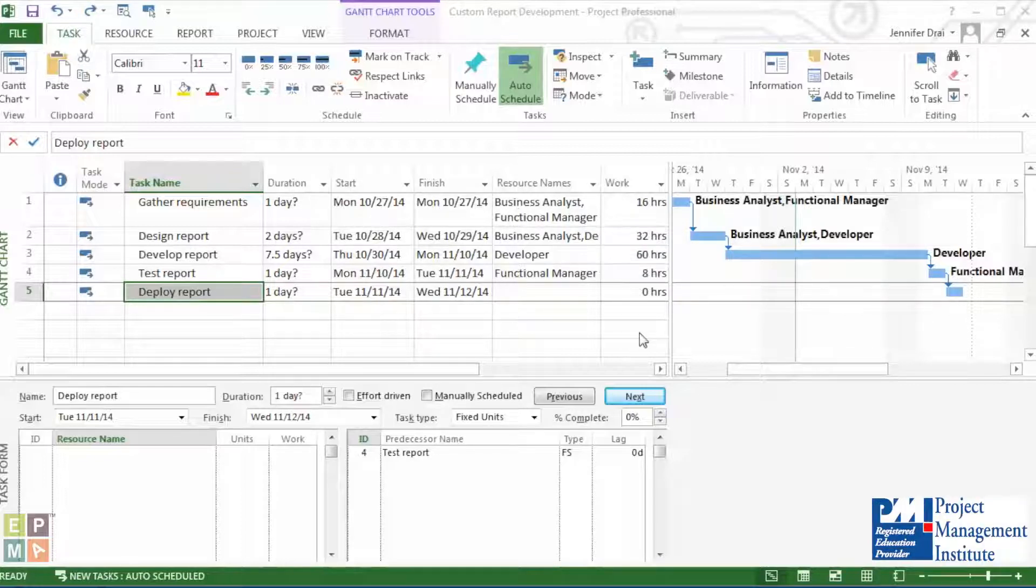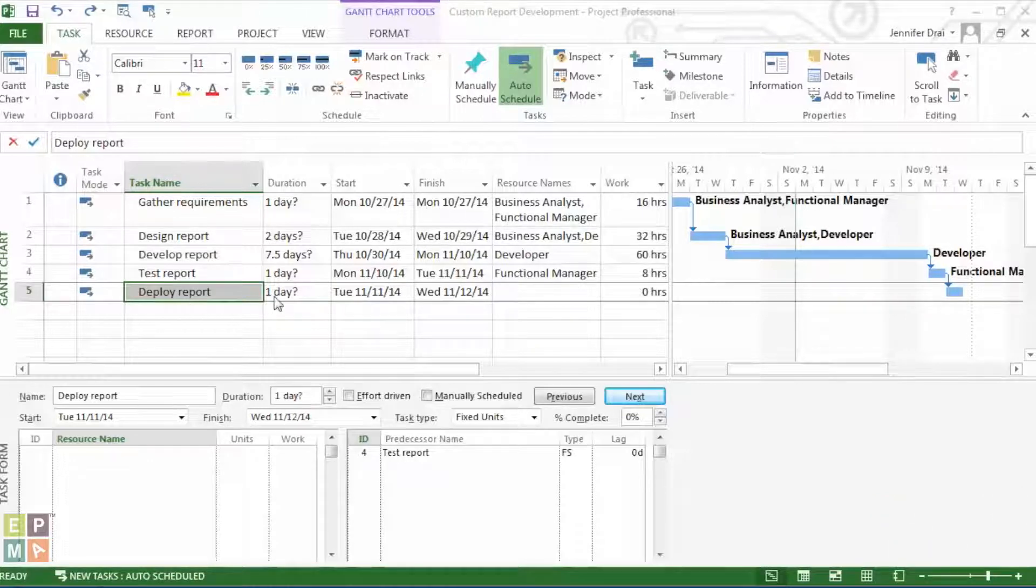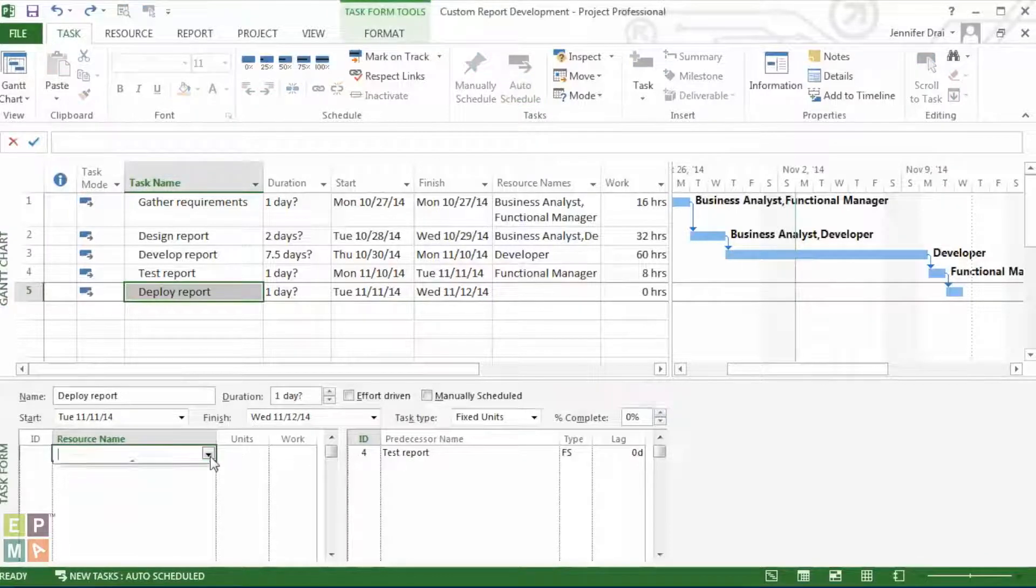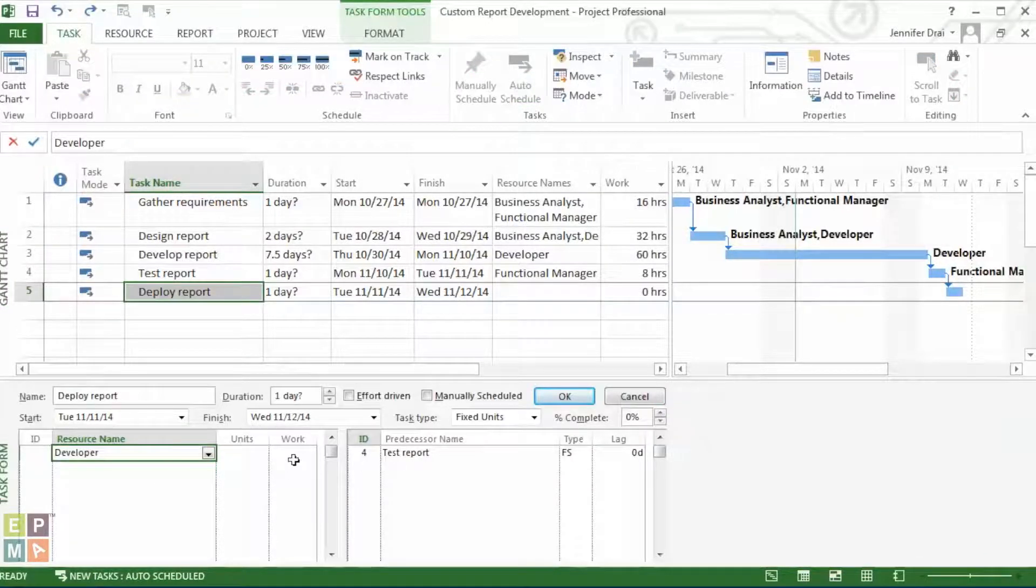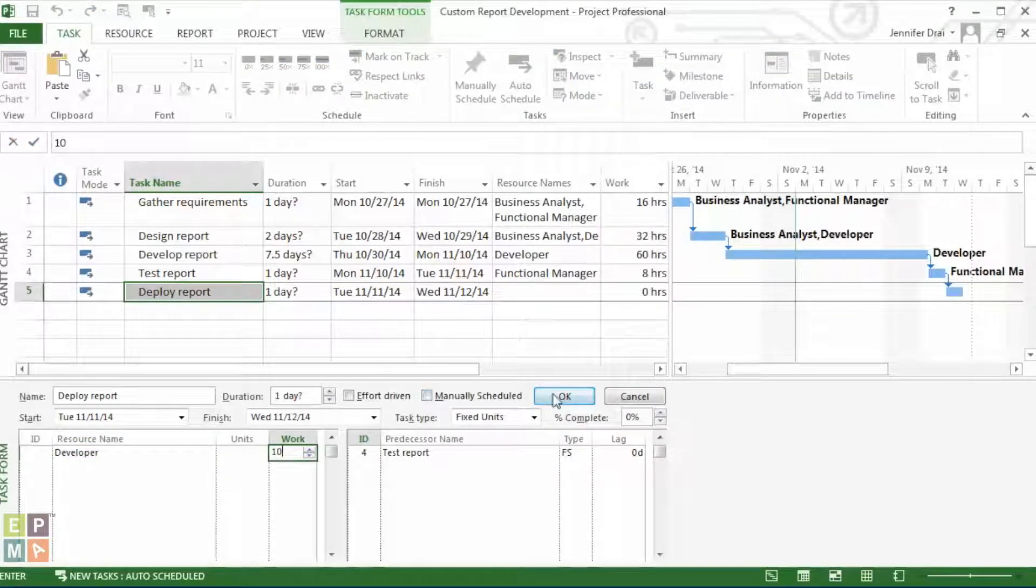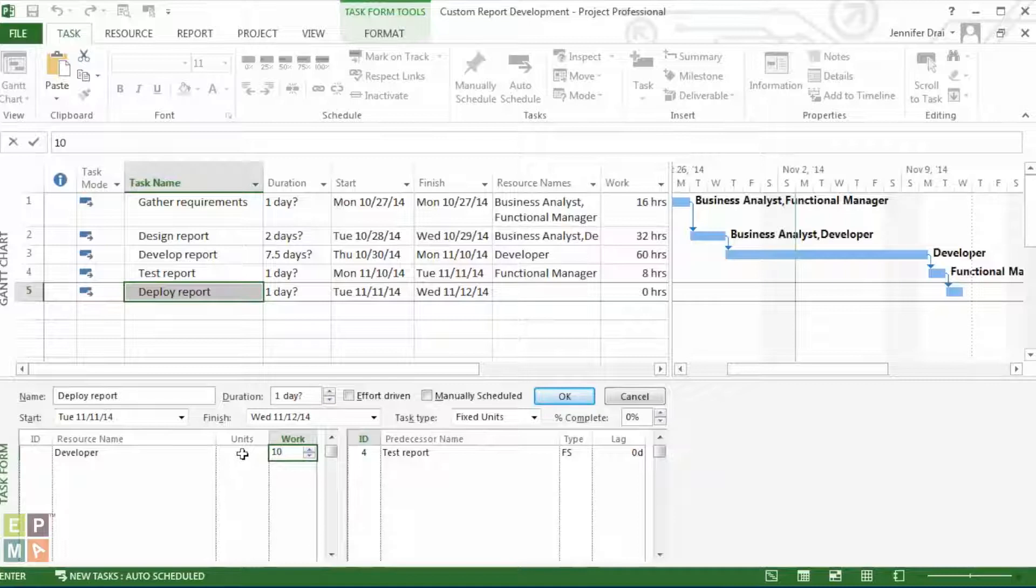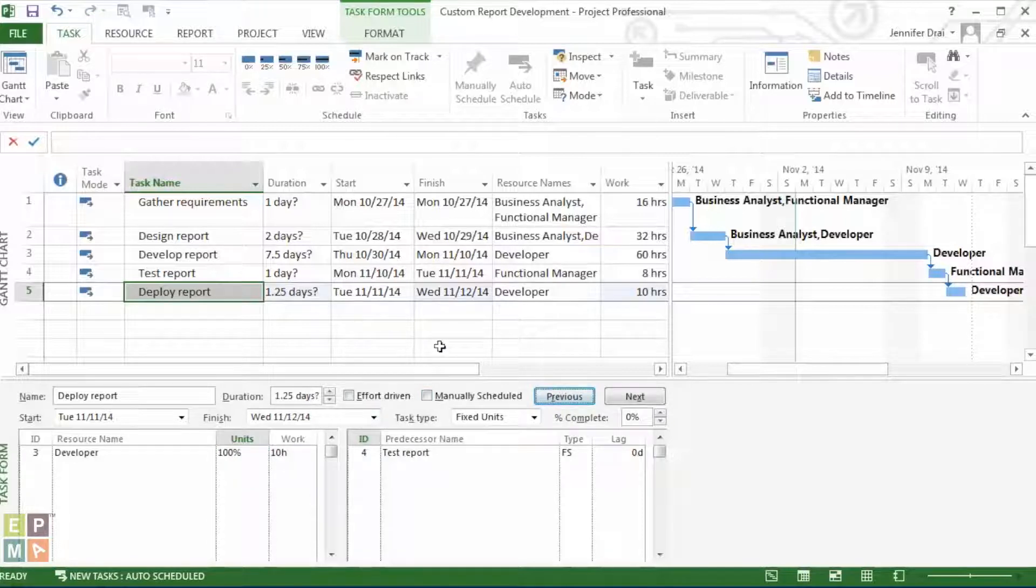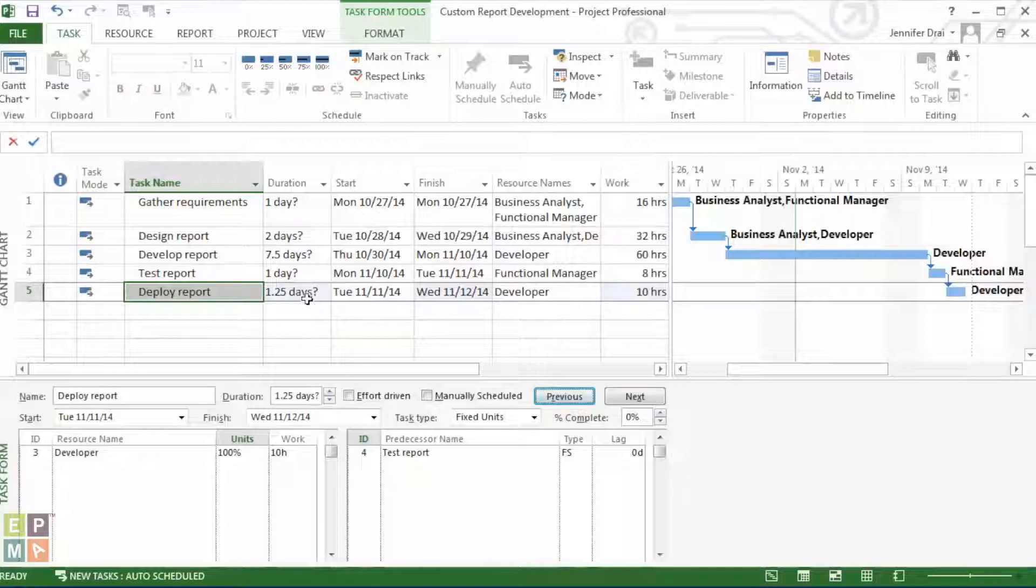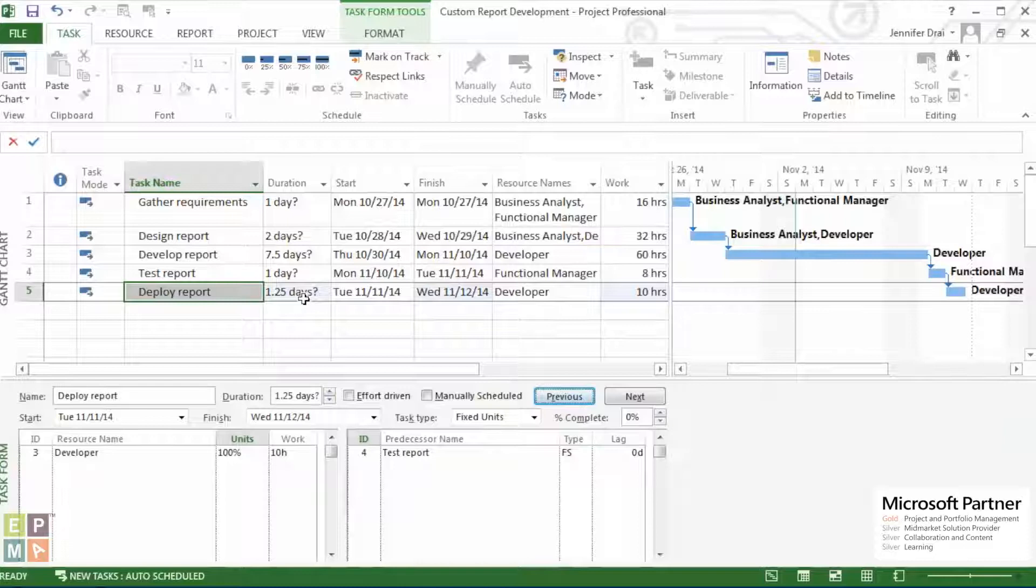On this example right here, let's go ahead and see how this works. For example, we know that deploying a report usually takes 10 hours, so we are going to assign that to the developer with the specific number of hours we know it takes. We will also leave it by project's default, which is assignment units of 100%. By clicking OK, we see here that the duration has been calculated by project as 1.25 days.